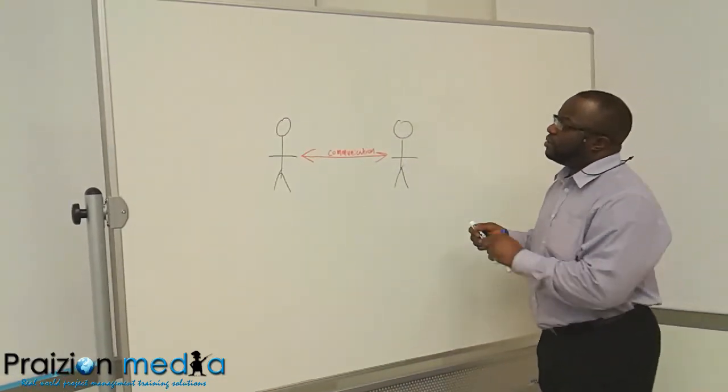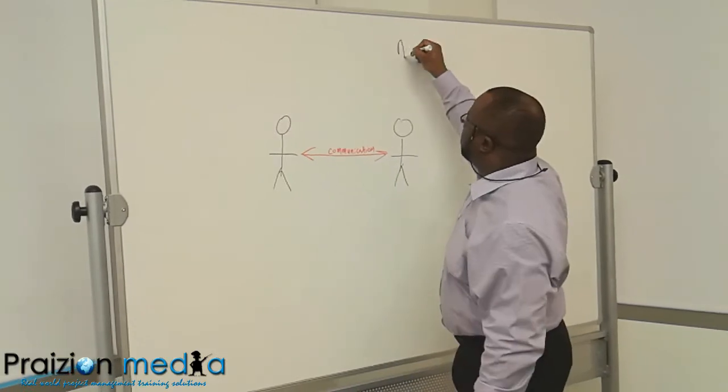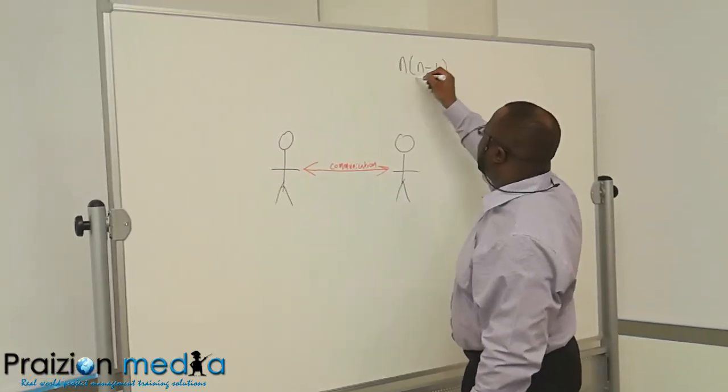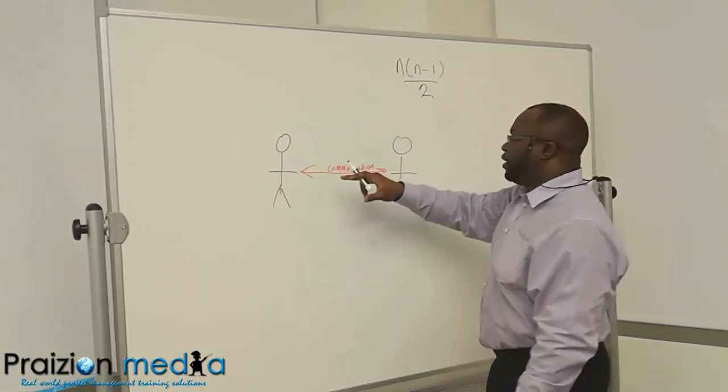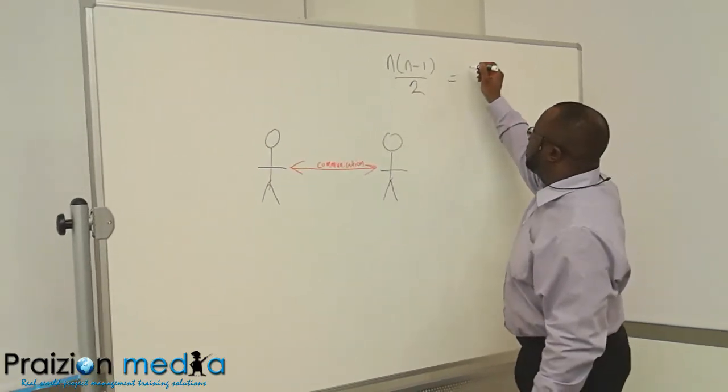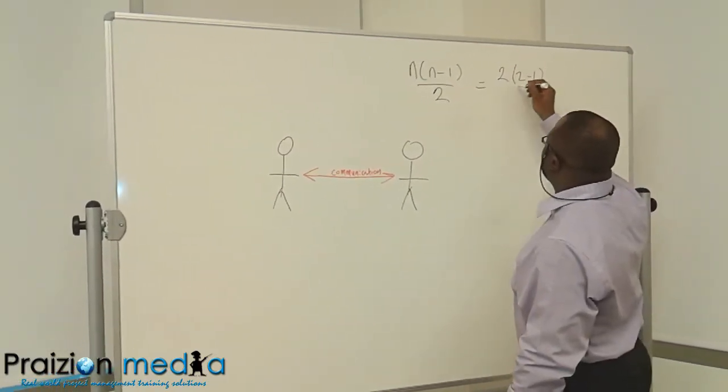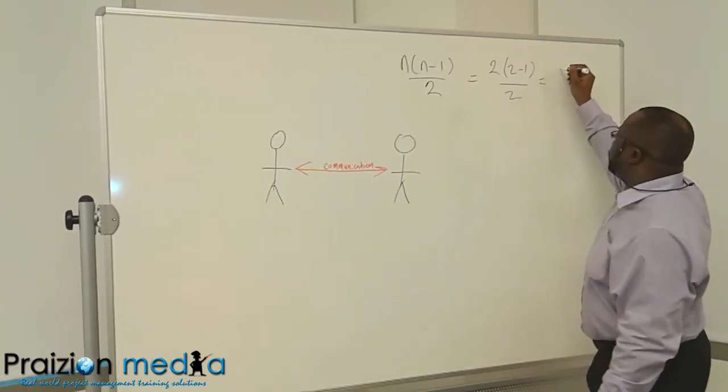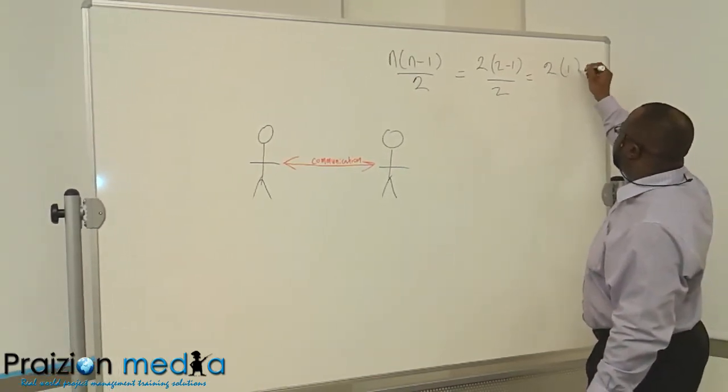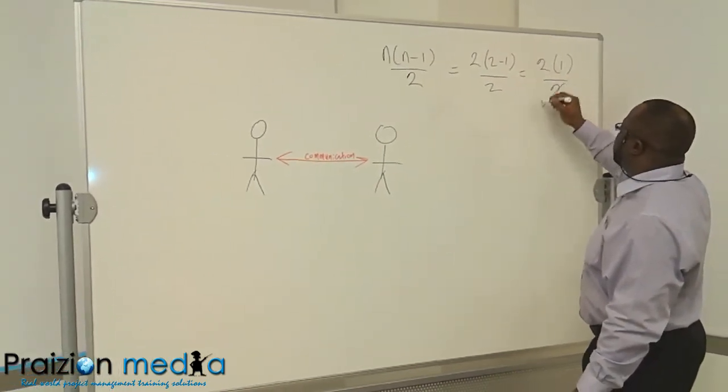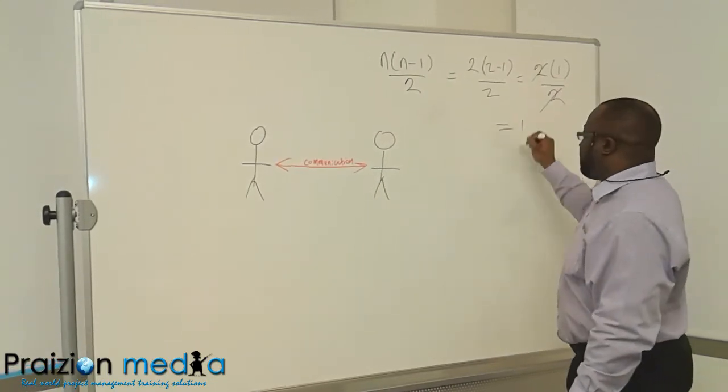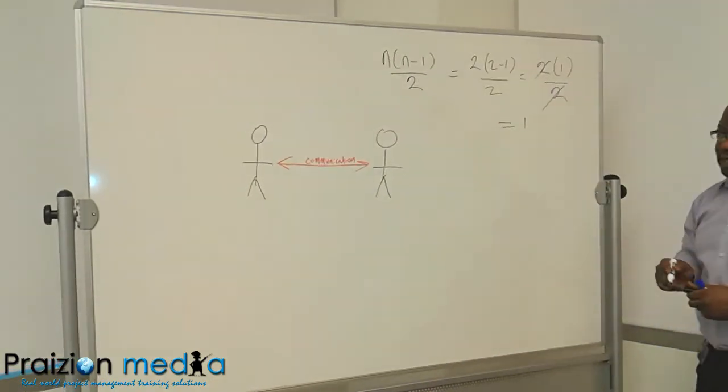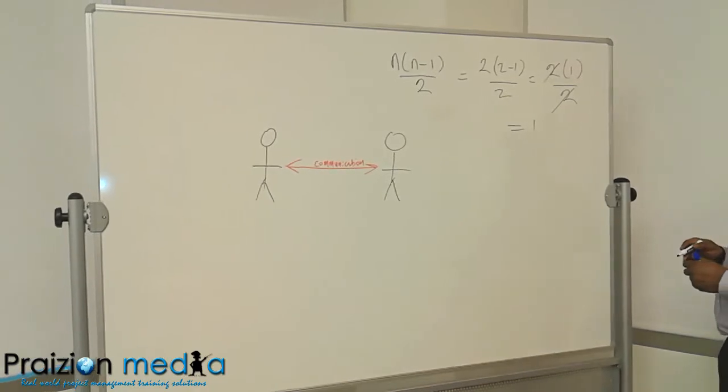The formula is N times N minus 1 divided by 2. If there are only two people communicating, you're going to have 2 times 2 minus 1 divided by 2, which is 2 times 1 divided by 2, which is equal to 1. So that's how you would tackle this in the first instance.